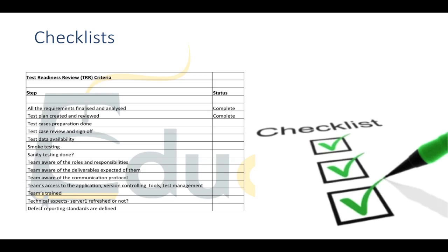However, if a particular test requires you to have MySQL knowledge and they don't have that, that will definitely pose an issue. So it would be a good idea for the test manager to go through a particular project prior to any team taking it on and highlight all the skills that will be required, such as MySQL. They need to have access to a Macintosh, they need to have access to XYZ tablets, or they need to have a working knowledge of JavaScript or something like that.